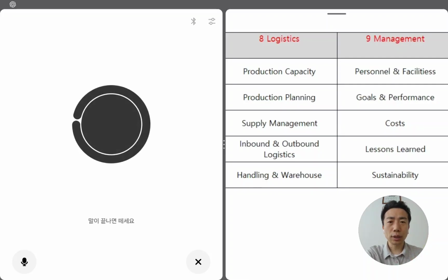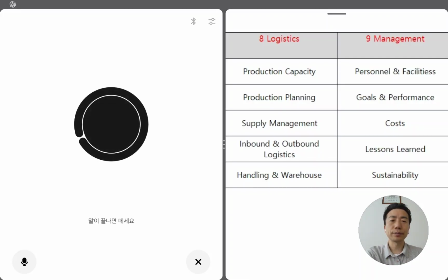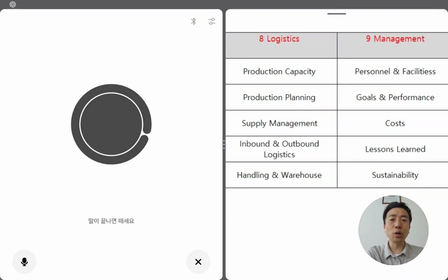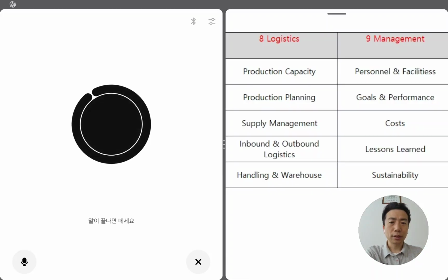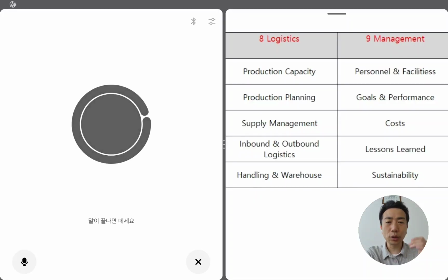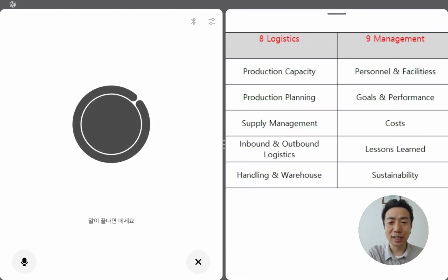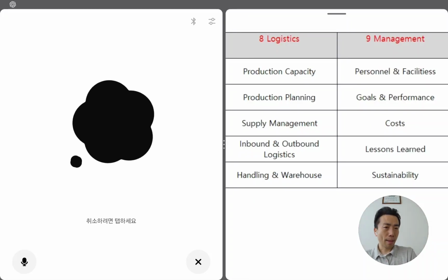First, I collect all issues that occur from development through mass production. This includes both major and minor problems across the process. We maintain a complete issue list. And then our multidisciplinary team, or MDT team, reviews it regularly. They select key issues to analyze further. These selected lessons are documented, reported, and shared across departments to support continuous improvement and meet our customers' high expectations. This process helps us avoid repeated mistakes and build stronger processes over time.